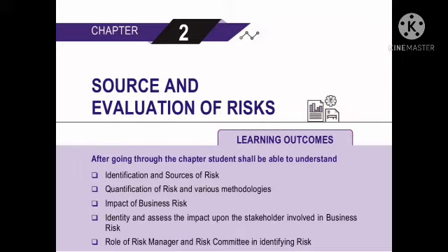F. Expected monetary value, as a tool for risk quantification, is the product of 2 numbers. Risk event probability, an estimate of the probability that a given risk event will occur. Risk event value, an estimate of the gain or loss that will be incurred if the risk event does occur. The risk event value must reflect both tangibles and intangibles. If Project A predicts little or no intangible effect, while Project B predicts that such a loss will put its performing organization out of business, the two risks are not equivalent.